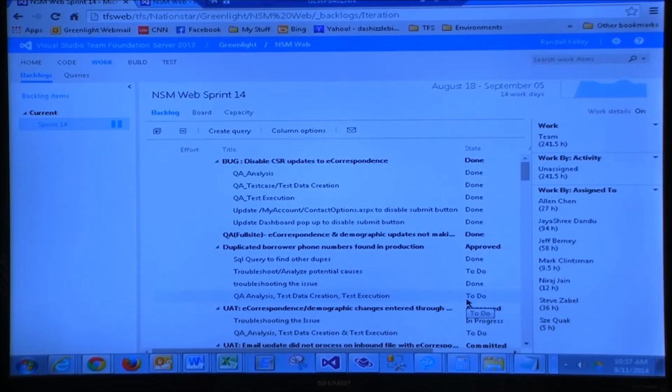Does it capture the old past items too? For a cut forward process, we're only moving outstanding tasks and production backlog items. We're not moving the old ones. The biggest reason for that is we can't quickly move attachments. So we don't want to go through the process of going through all the old ones and taking attachments and reloading them, unless someone's really got a lot of free time on their hands.